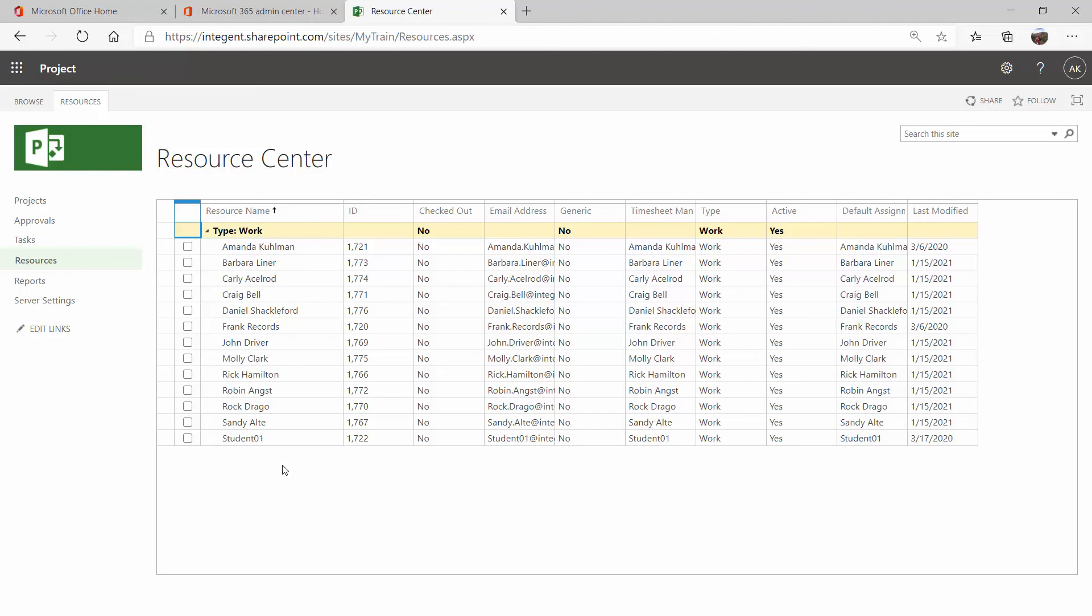You can still add them at the admin portal level to the different security groups, still sync them over. They will pull over here along with their email addresses and any of the other information that you have captured in Active Directory. And it'll pull over here to the resource center.